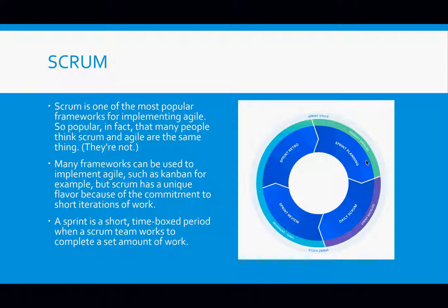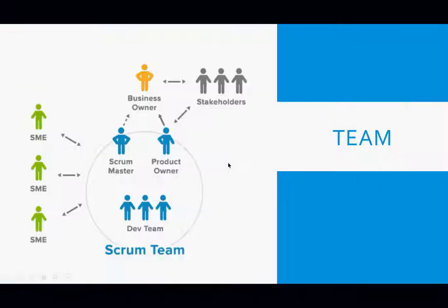But in Agile, it's not like that. In 2 weeks, you're going to say, we're going to do only the registration and login, and that's it. Within 2 weeks, you'll be able to show that the user can register and the user can log in, and you commit to that. That means that within 1 or 2 days, as a tester, you are able to get something from developers. You're not sitting for a few months before you can actually get something.